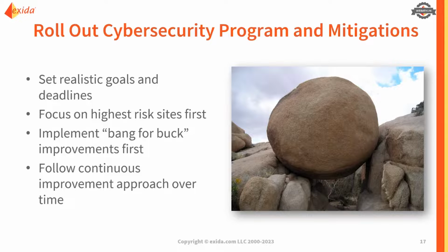And so using the results of that risk assessment to know what are the most important controls to apply, knowing what are the areas where they're most needed, can help us focus that effort and start with pilot sites. Once we work out the kinks and understand any of the specific challenges that we're going to face, we can then deploy it more effectively at other sites.